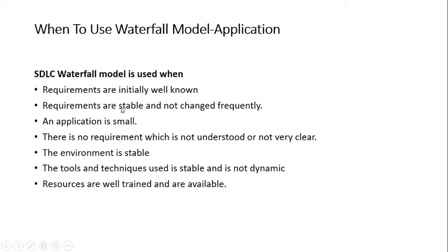Then requirements are stable and not changing frequently. So stable means it should not be changing. Stable means constant. Whatever you have initially, that will remain throughout. It is not going to change at the intermediate step. Then only the waterfall model is applicable. Now this model is used for small applications only, because in large applications you have to go back and make the relevant changes now and then. So that is not possible.